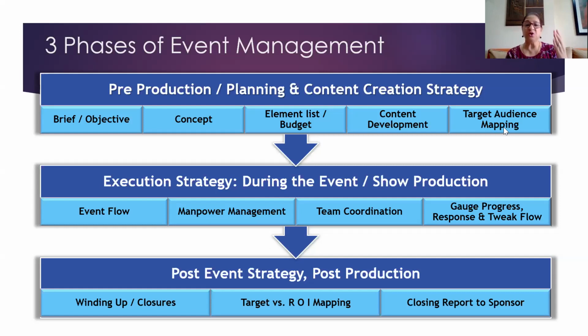Obviously, there has to be good team coordination. Like I've always said before, good event planning is each one given their responsibilities, doing their jobs well to the T, and continuing to interact with each other. We have weekly meetings. As we go closer, we have meetings every 2 days, after the end of the day, to take progress reports.